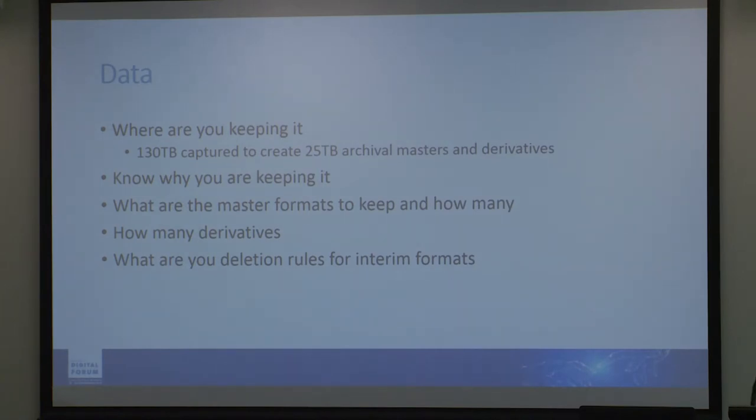End of the project. So long or short, projects always come to an end. And there are a few things to cover before you can say it's done and dusted. Performance. So you want to actually revisit those original goals and compare the final outcome to whatever was agreed in the original scope, and how well that project has performed. Heritage items are challenging, and if it has all gone well, then you want to celebrate those successes. And even if it hasn't gone as well as you hoped, it's important to recognise your team's effort.